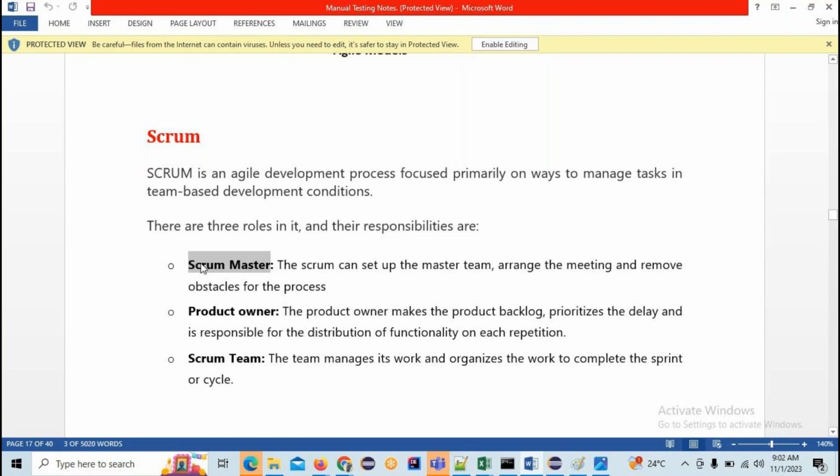Okay, in a few teams, not everyone is there in the Scrum meetings. For example, we have 16 testers. The 16 testers are going to be divided into 4 Scrum meetings. In each Scrum meeting, there will be 4 testers. Of those 4 testers, one will be the test lead. The test lead will take care of all the features, and how much time it will take to complete a particular feature. They are going to give the time estimates for the execution of testing a particular feature. The remaining people have to learn from the test lead how he is giving them.